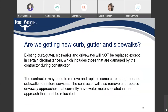Are we getting new curb, gutter, and sidewalks? Existing curb, gutter, sidewalks, and driveways will not be replaced except in certain circumstances, which includes those that are damaged by the contractor during construction. The contractor may need to remove and replace some curb, gutter, and sidewalks to restore services. The contractor will also remove and replace driveway approaches that currently have water meters located in the approach that must be relocated.